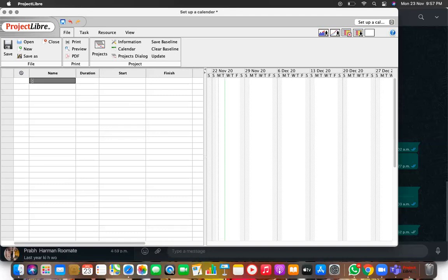Then, talking about the remaining three calendars, that is the project, task, and resource calendars, they all use a base calendar to start, but can be altered to account for use cases. These calendars are useful in modeling reality, and also in project work. A good example is a 24-hour calendar assigned to a material resource like a machine that works around the clock. Now the project, resource, and task calendars work together.